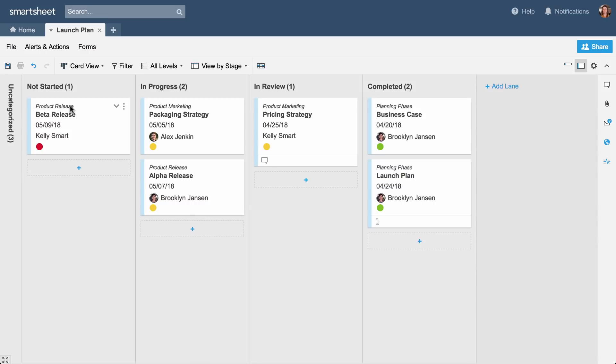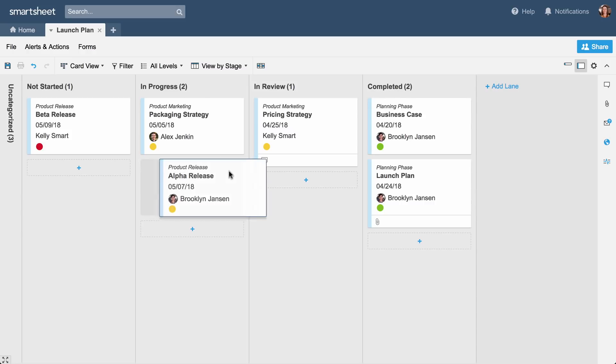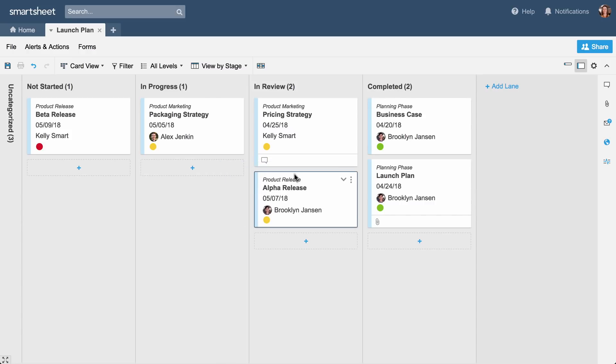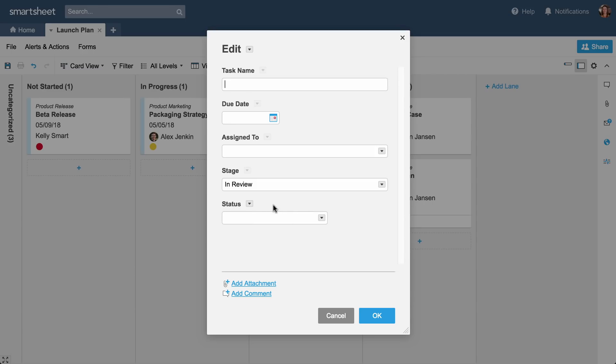In Card View, different columns, called Lanes, correspond to the options from your drop-down list. In this case, the cards are organized by stage: Not started, in progress, in review, and completed, because the stage column is a drop-down column in the sheet we created. You can rearrange cards and add cards. Each card you add becomes a row in your sheet.